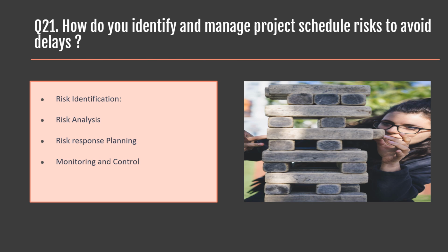In qualitative analysis, she assessed the impact and likelihood of each identified risk and categorized them as low, medium, and high. In quantitative analysis, she assigned numerical values to risks to estimate their impact on the project timeline.